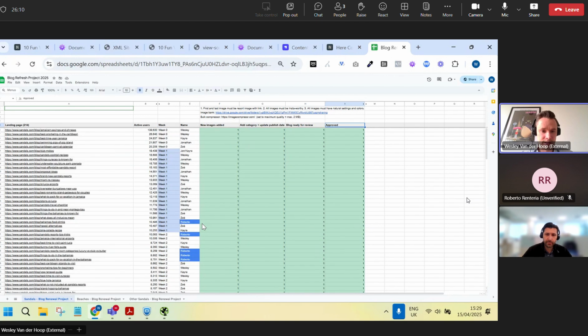And then ideally, we're going to have around 150 pages, between 150, 160, depending on your findings. Then the next step is to look at, okay, when do I want this to be finished? I probably want this project not to take any longer. Since we're passing all block activity, there's a bit of a rush to it, we need to prioritize it. Ideally, we finish this within 2 weeks. The maximum it should take us to get this ready is 3 weeks, definitely not longer.